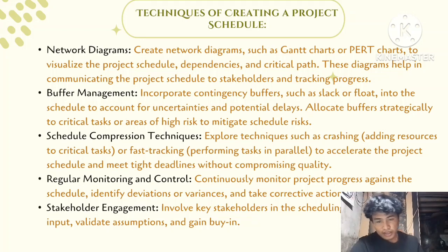Schedule compression techniques. Explore techniques such as crashing, adding resources to critical tasks, or fast tracking, performing tasks in parallel, to accelerate the project schedule and meet tight deadlines without compromising quality.